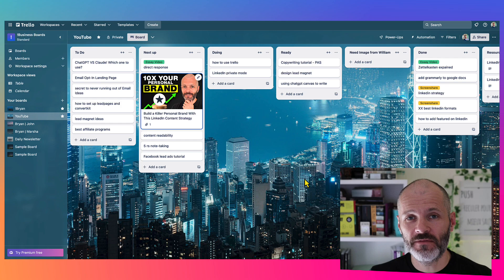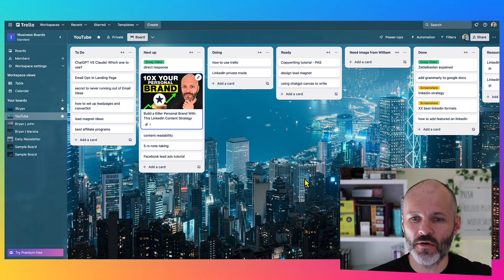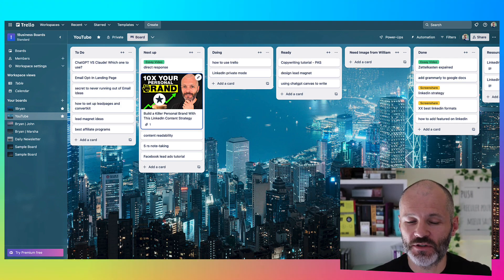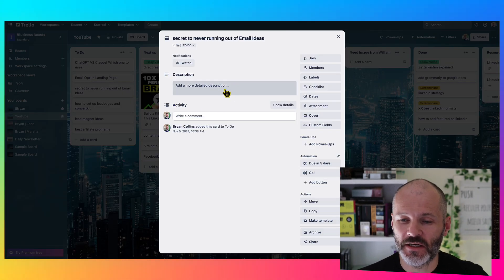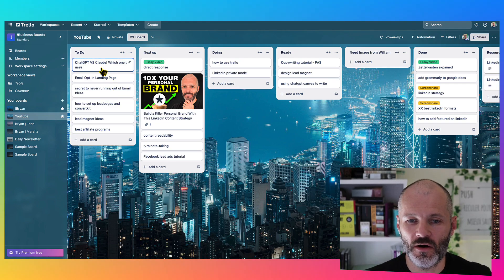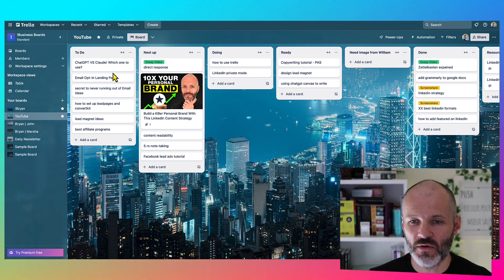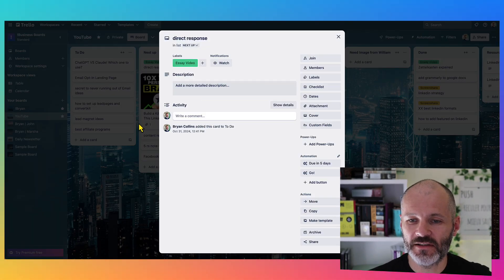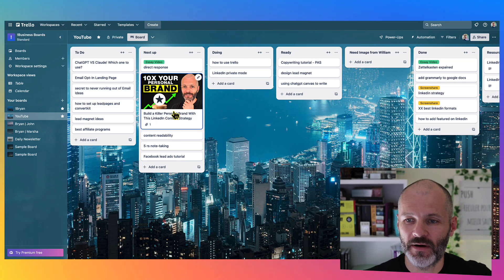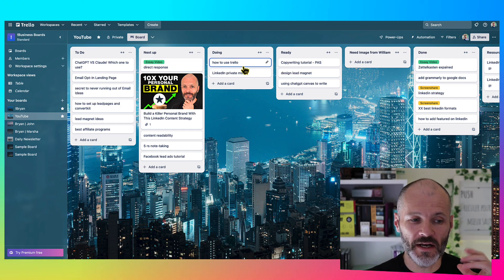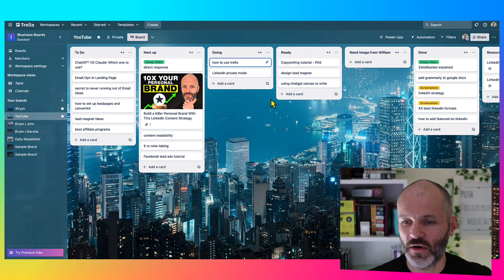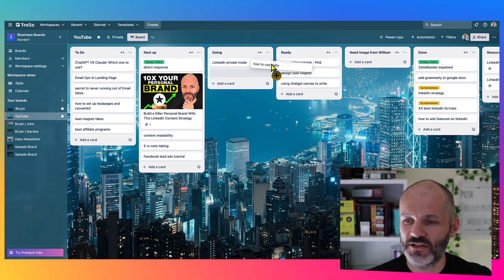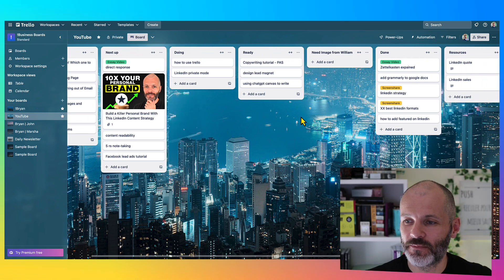So this year, I wanted to publish more YouTube videos on the channel. So to help me manage the process, I created a dedicated Trello board. So it's based on the principles of Kanban with a few additional options. So in To Do, I'll put my ideas for videos. Sometimes I'll have notes about the video that I want to record here. Other times I'll simply drop in a link to a Google Doc or to an outline of the video in question. Then when I'm planning what videos I'm going to record, and I like to record two or three videos at any one go, I'll drag it to next up. So these are basically videos that I have the script for, or perhaps I have the cover image for, and which are ready to work on whenever I'm going to turn on my camera. And then I'll drag over two of the cards when I'm actually working on a video on a given day to the Doing column.